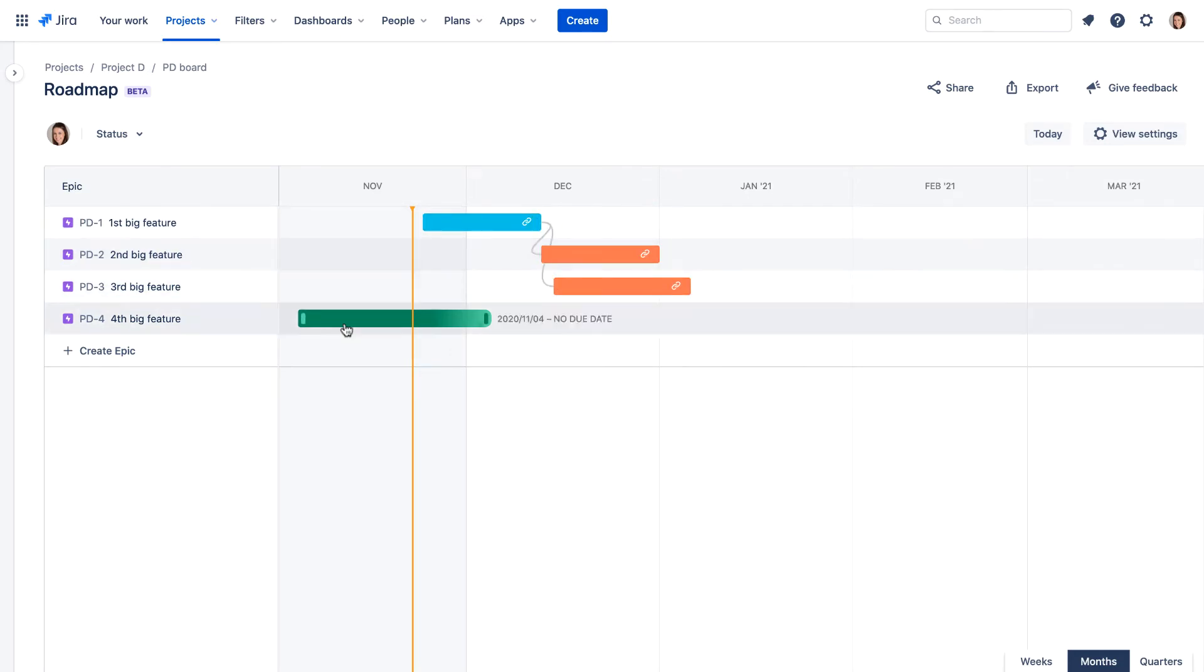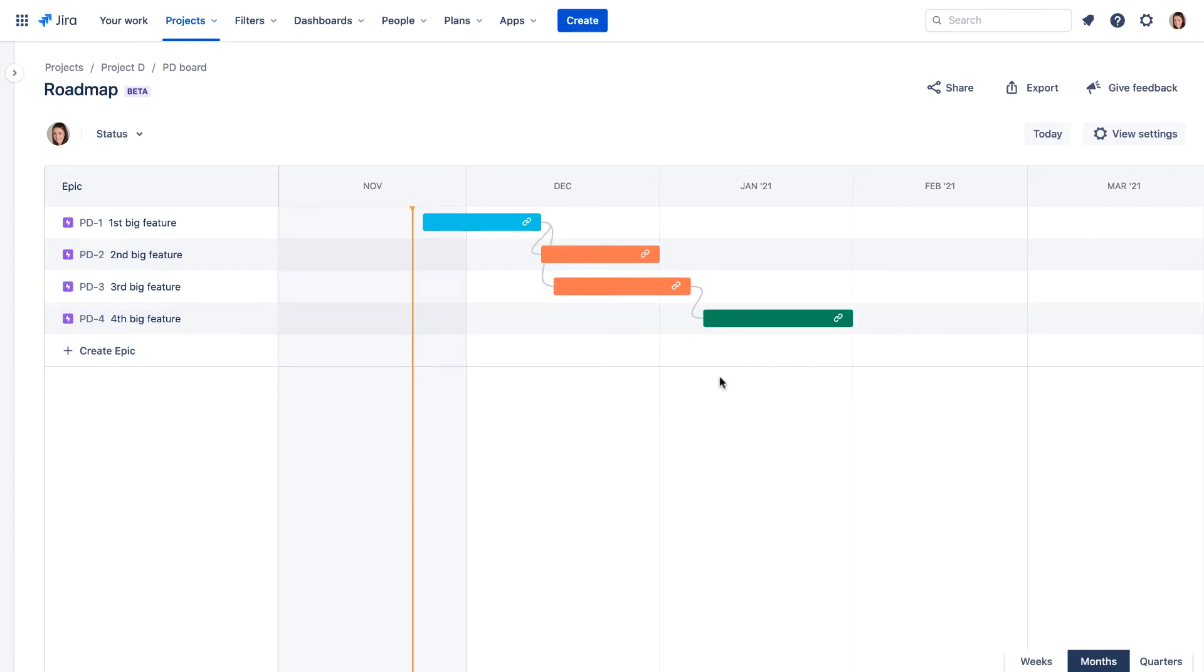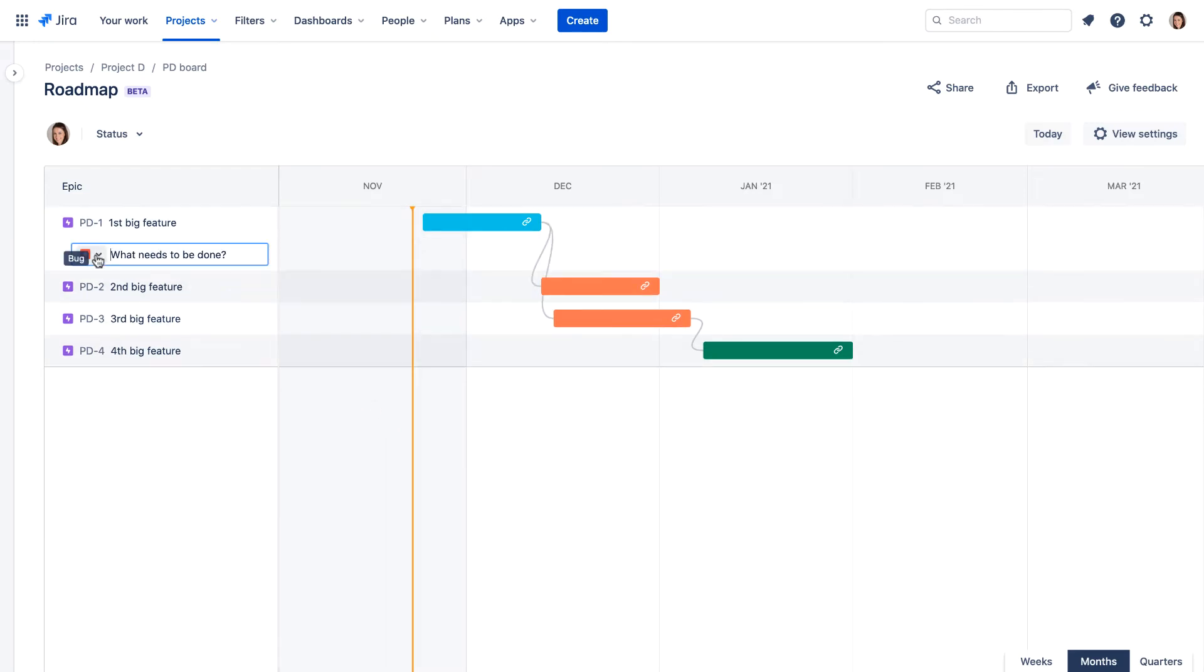We can also connect the end points of the epics to indicate project dependencies. We're able to create issues related to the epics directly from the roadmap. So let's create three tasks for the first epic.